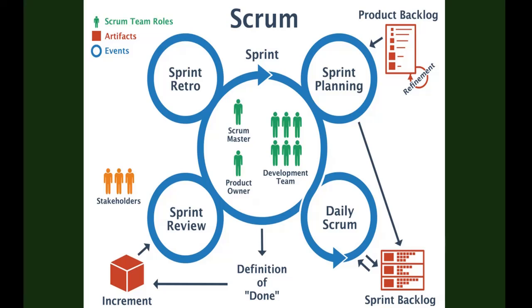You should give some explanation, because in Agile they believe that if you complete the more important things upfront, then sometimes you do not need the less important things at the end of the project. If your budget is cut, you don't need the less important things. So they do the important things first, and if there is any issue, they don't worry about the non-important things later.